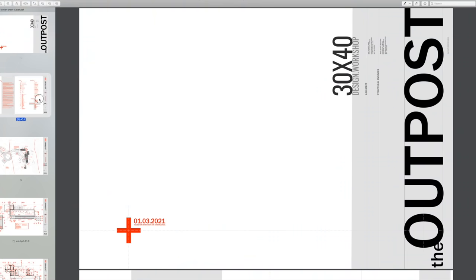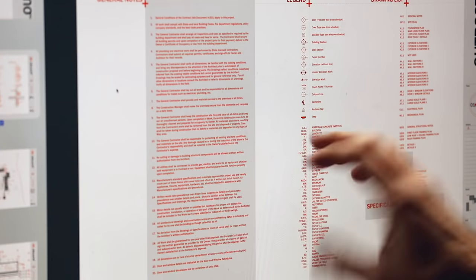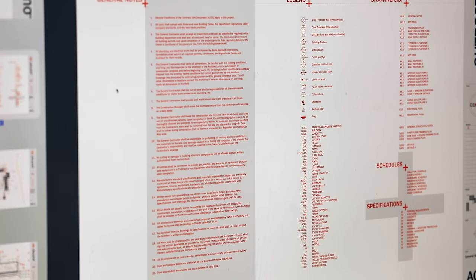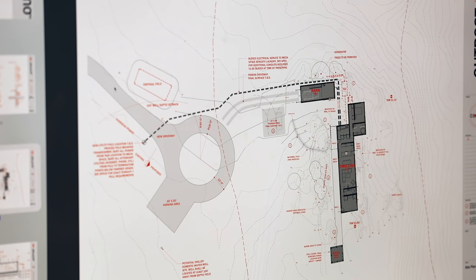We have our drawing set here — about 35 to 40 drawings at the moment — and we always start off with the very general and move to the specific. Any written word takes precedence over a drawn line, in the same way that a large-scale detail might take precedence over a smaller-scale detail. The opening sheet is just to orient the viewer to our drawing conventions, symbol legend, abbreviations, and an index of all the documents we're providing to the contractor. The opening sheets are generally site plan, landscape drawings, and overview drawings — taken from the 30,000-foot level.